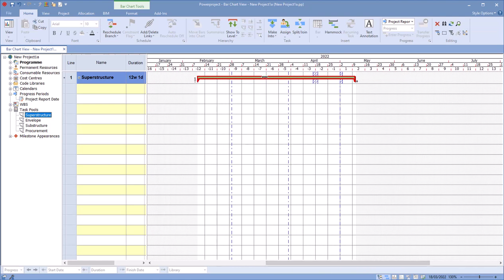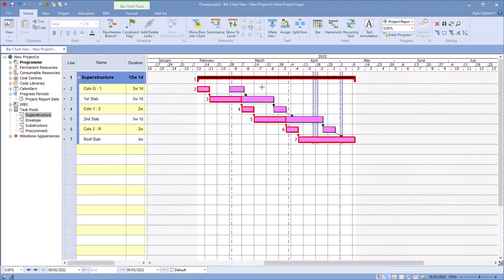As you see here, they're predefined tasks that can have resources assigned to them, costs assigned to them, code libraries assigned to them, links already set up and defined. So if I wanted to use that, I've got superstructure.